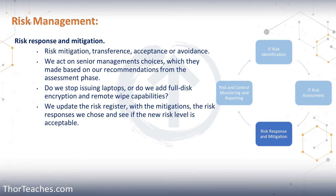Then we update the risk register — that giant Excel spreadsheet that had a list of all the risks and all the pertinent information about each specific risk. We implement the countermeasure, the risk is lowered, and the whole point of risk management is to reduce the risk to an acceptable level.